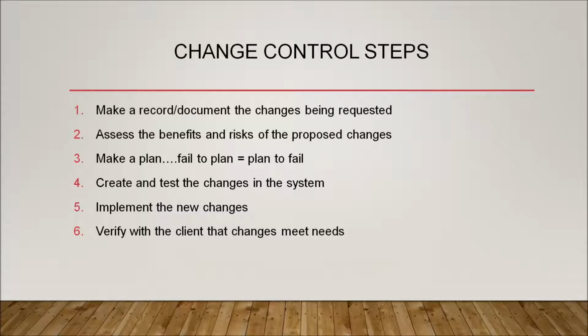If you fail to plan, you plan to fail, is the old adage. You want to create and test the changes in the system before you implement them, because you want to know how you're going to break it before everything goes live. You need to implement the new changes, and then you want to verify with the client that the changes meet their needs.